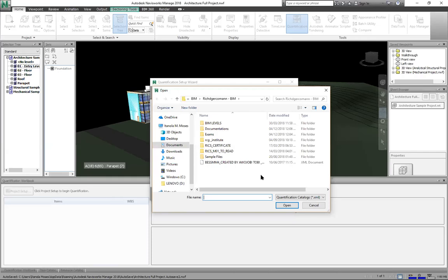So that is, we are expected to be going through that as we are going through this, because the document has been formulated. The document has been compiled and we are expected to follow it. So the BSMM4, which is what is being used in the Nigerian construction industry, like I noted again, every industry in every country has a set of guides that is guiding the estimation process. The BSMM4, which is the Building and Engineering Standard Method of Measurement, which has been compiled by the Nigerian Institute of Quantity Surveyors, is what is being used in the industry.